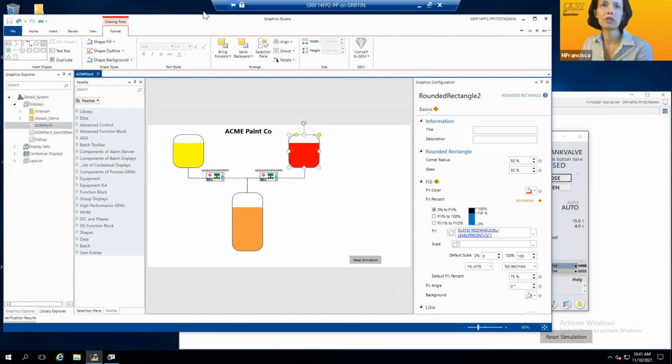The very first time we did this, Amanda, I don't know if you remember, it was with one of our product owners and we didn't think about it. He was demoing and I guess there was an expectation that he was supposed to look at the chat too. There was just no way he could talk, demo, and then look at the chats or questions that were coming in. So we quickly learned we needed to designate a facilitator, a moderator, and have the person demoing the product have just that sole responsibility. So that's a great point.